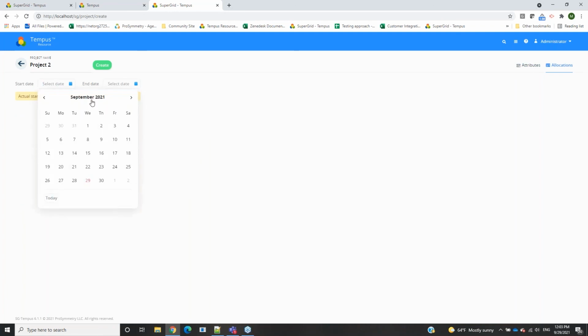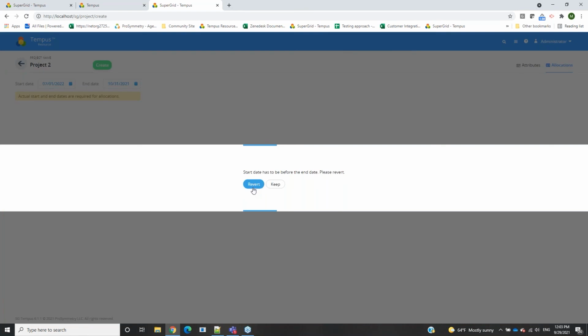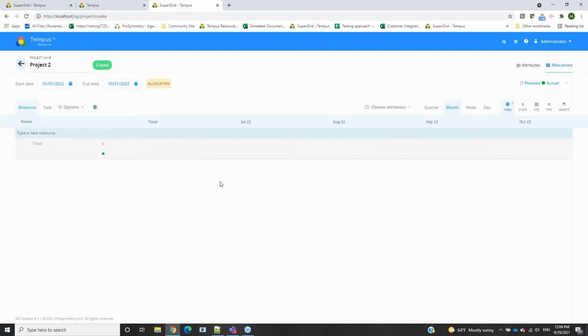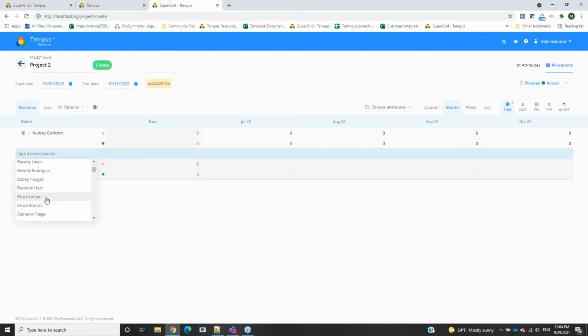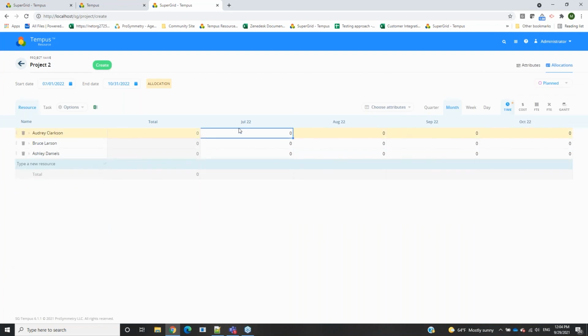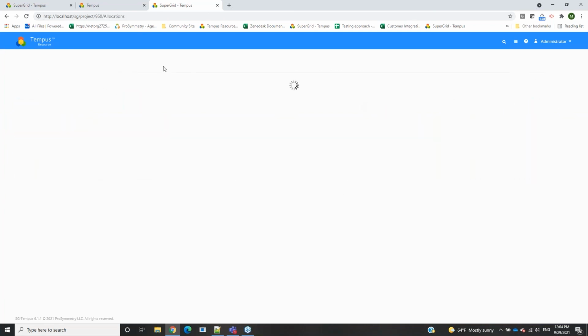Lastly, I'm going to go ahead, let's say this is a project, it's going to start in July of 2022, and then it's going to end in October, the end of October. And let me go ahead and make sure I select the right dates, so 2022. And then I'm going to assign some resources down below and apply some planned allocation to them. So let's say we're going to need 1 FTE of this for Audrey's time, 0.5 and 0.75 of Ashley's. Throughout the entire duration, I'll copy that over and just create that.